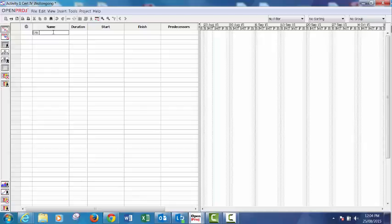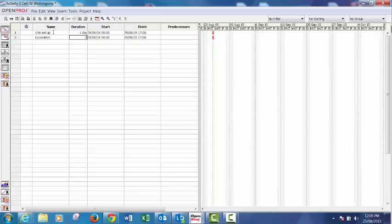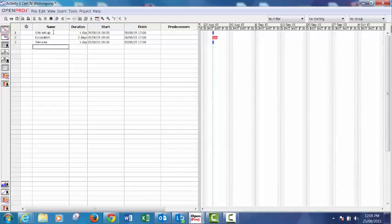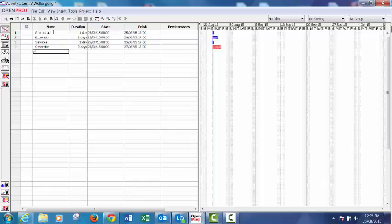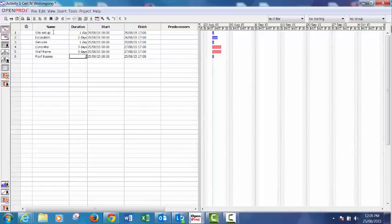All right, first step is complete the activities. One day for site setup, I'll go as quick as I can so I don't waste anyone's time. Two days for excavation, services one day, concreter three, wall frame three days, roof trusses two days.